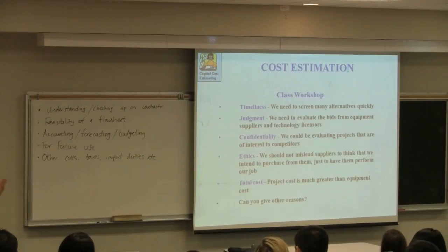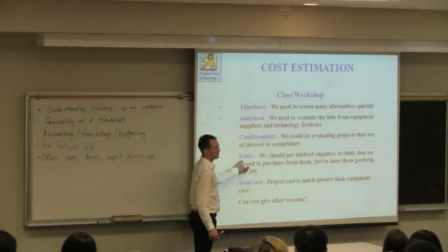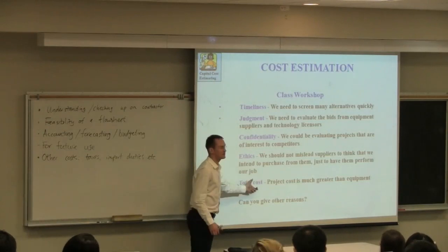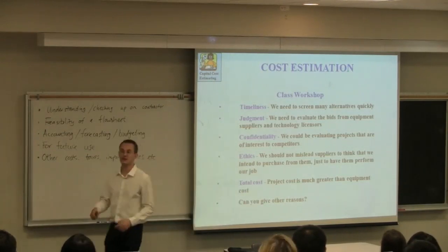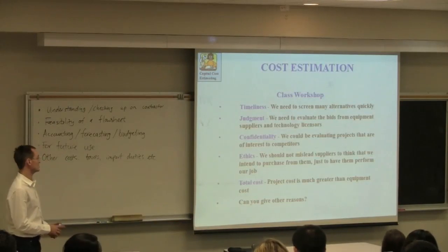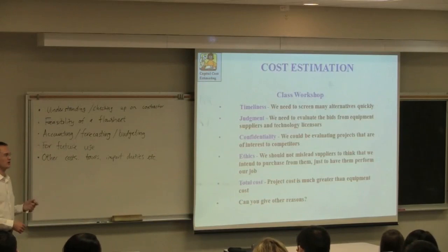So you need to know those ballpark figures. And then finally, the vendor is going to give you the price of the equipment, probably, and not install. But there's all sorts of other costs that go with it. We're going to see here that the cost of the equipment after installation is usually 3 to 5 times that of just the capital cost of the unit itself.